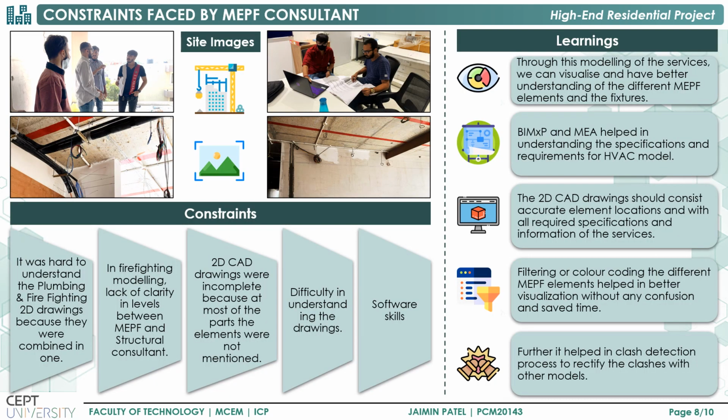The next are the constraints which are based in the modeling MEPF services which are mentioned. So first is the drawings were incomplete, then the lack of software skills, then the changes were continuously happening in the architectural drawings, due to which the services drawings were also changed continuously, due to which the rework is done as we can see in the images.